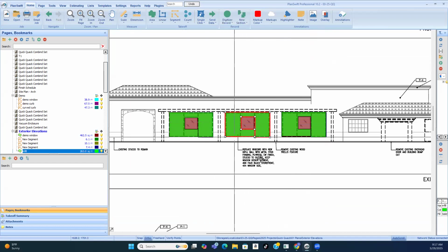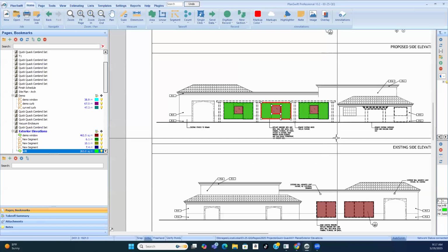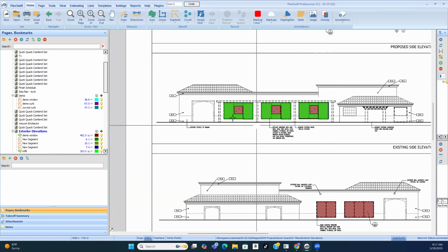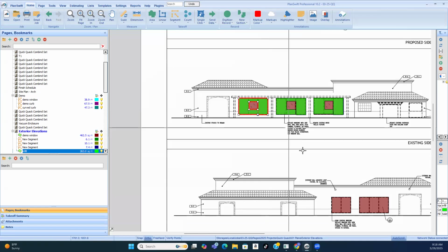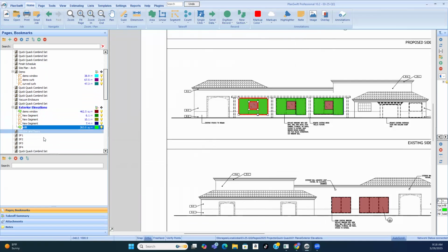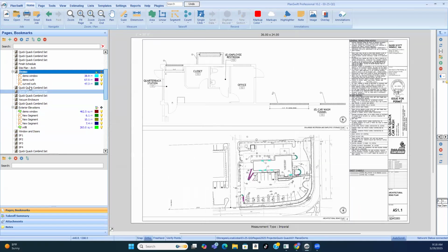When we do this, I'm going to give you one estimate, which I don't recommend, but the GC probably would like to see it if you're the demo person doing all this extra stuff. So we have a demo estimate portion at the top, and at the bottom we'll have additional cost. The additional cost is infilling, the framing, and then infilling the concrete and all of that. And I'll break it down very detailed so you can see.